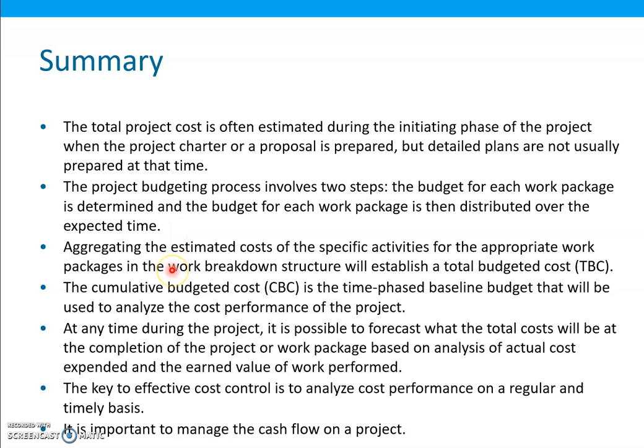Aggregating the estimated costs of the specific activities for the appropriate work package in the work breakdown structure will establish a total budgeted cost.